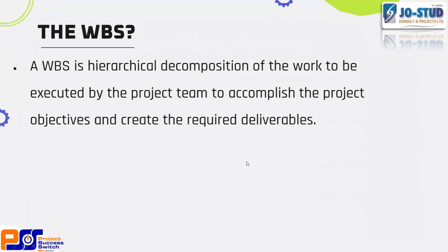It will include getting paint, cleaning the surface. You may want to scrub the surface. You may want to mix the paint. Then you may want to apply the paint, right? If it's plastering, it has its own process. So the process by which you decompose your work elements or your activities into small measurable chunks that you can now easily estimate, whether it's time you want to attach to it or cost you want to attach to it, that hierarchical decomposition is what we call a WBS, and it actually has numbering.